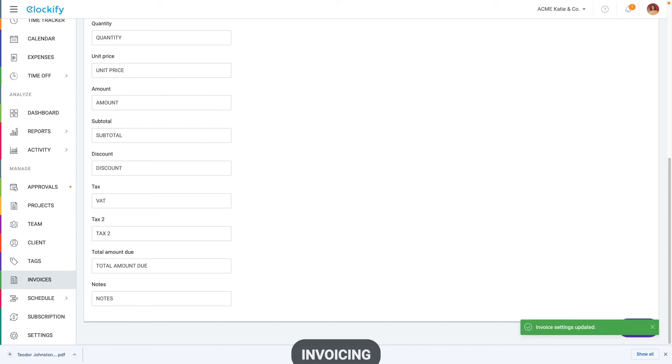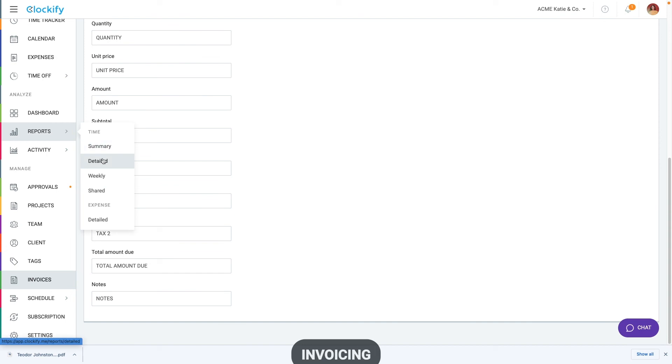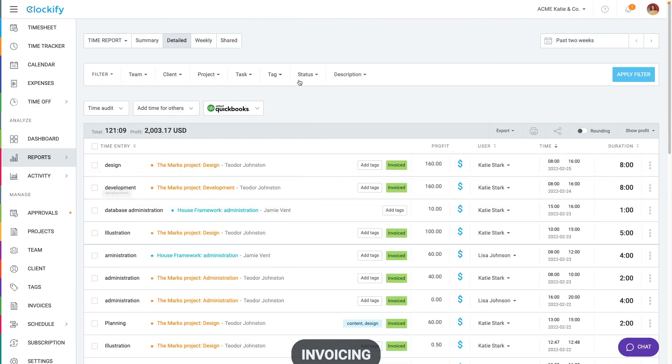To see what you haven't invoiced, go to the detailed report and filter by status, uninvoiced and billable.